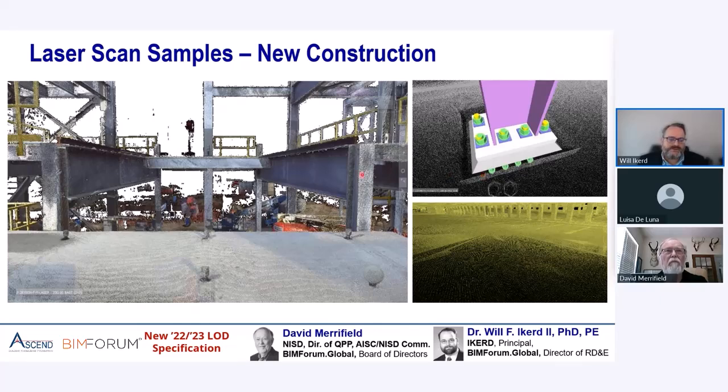And so laser scanning became important, and part of the specifications in this was anchor rods to LOD 350 with a tolerance and referenced AISC tolerances. This would be an example of how the LOD spec is used in tandem with reality capture.